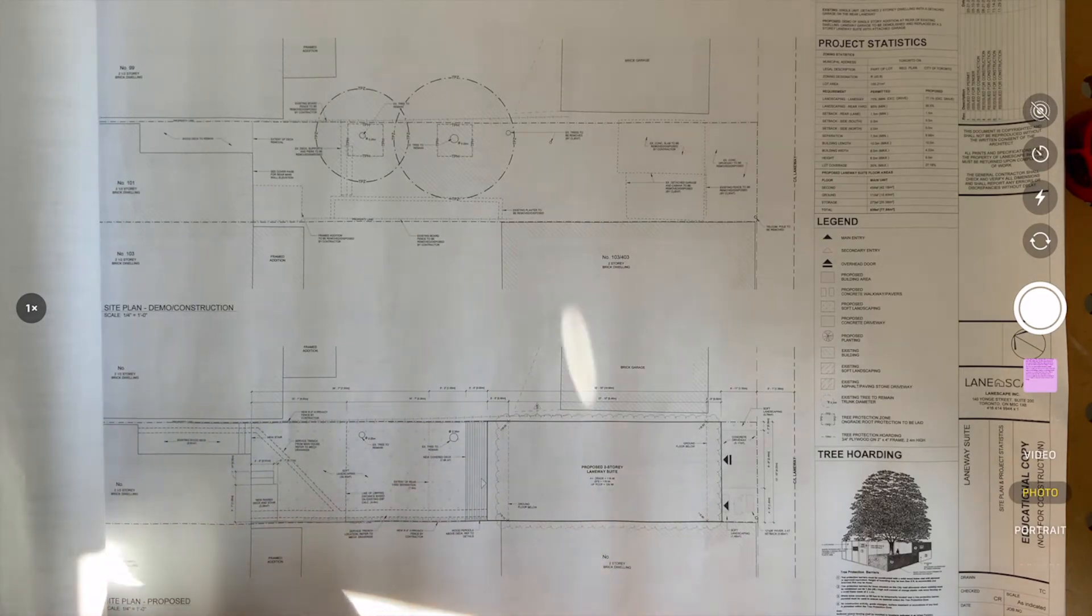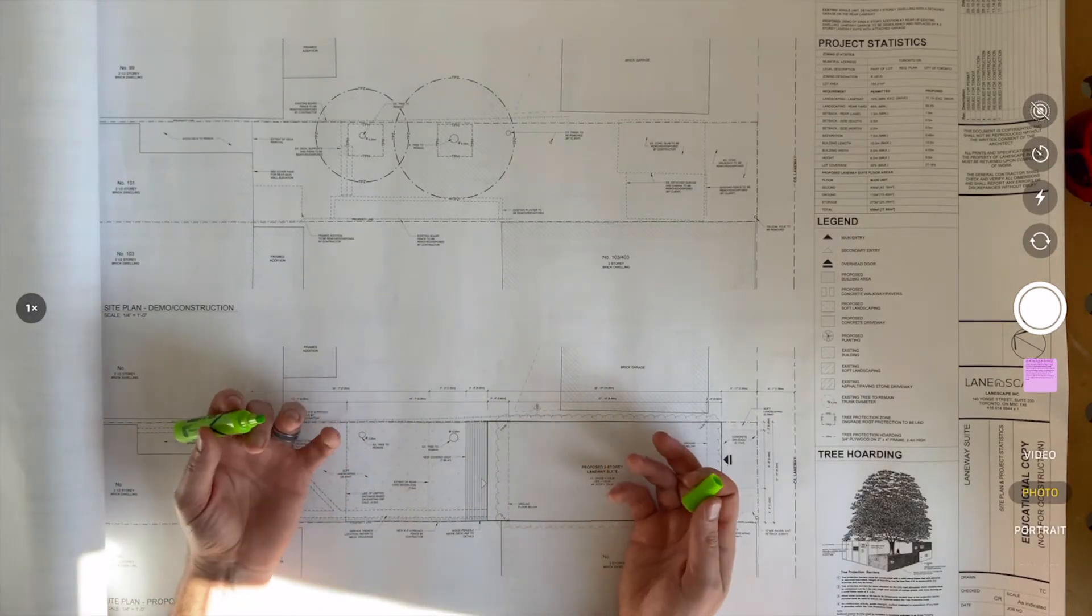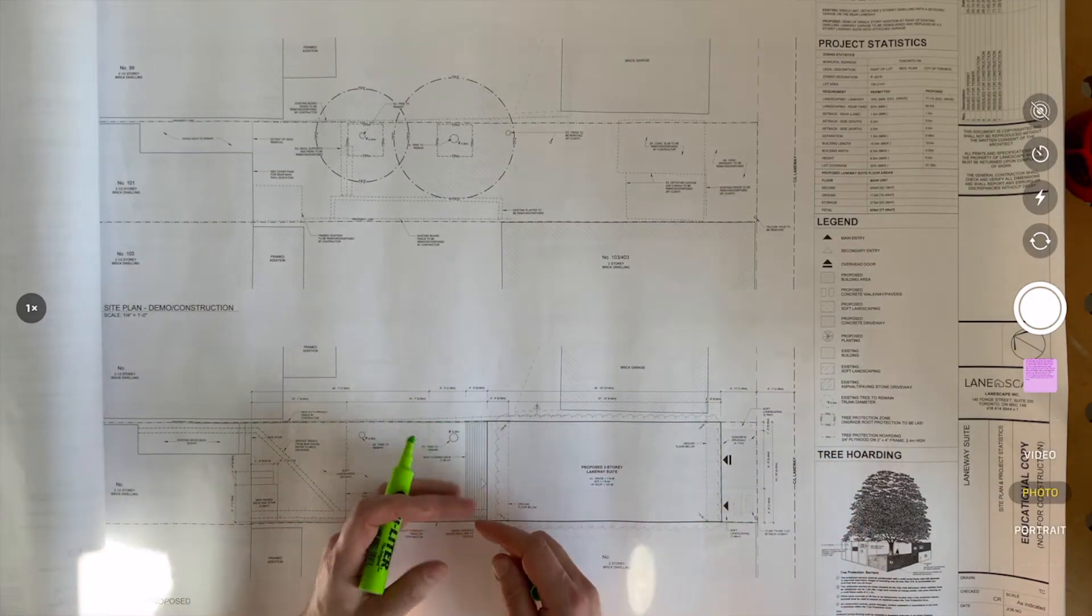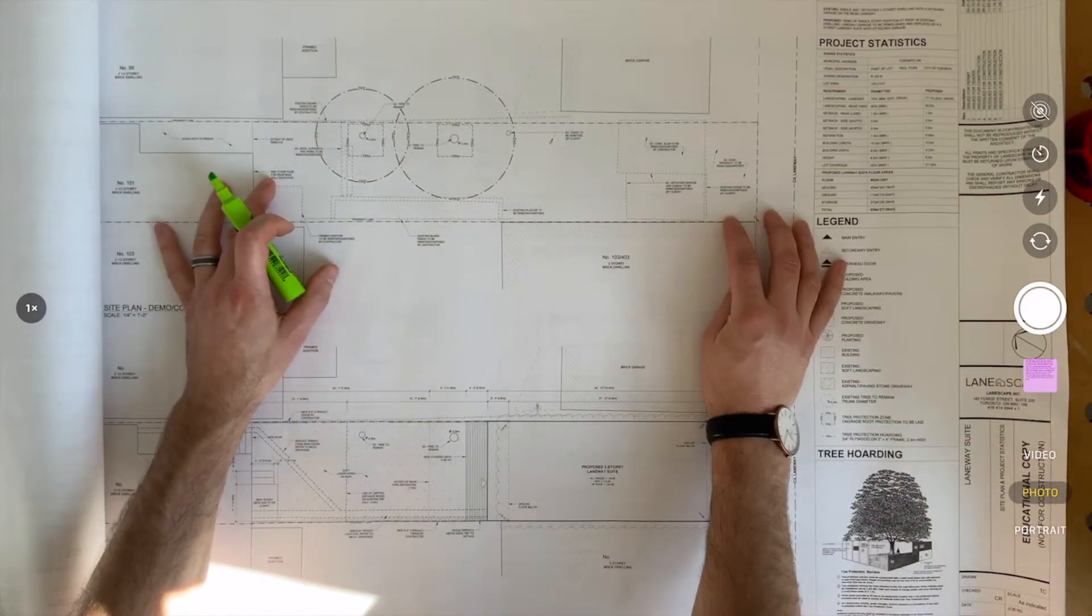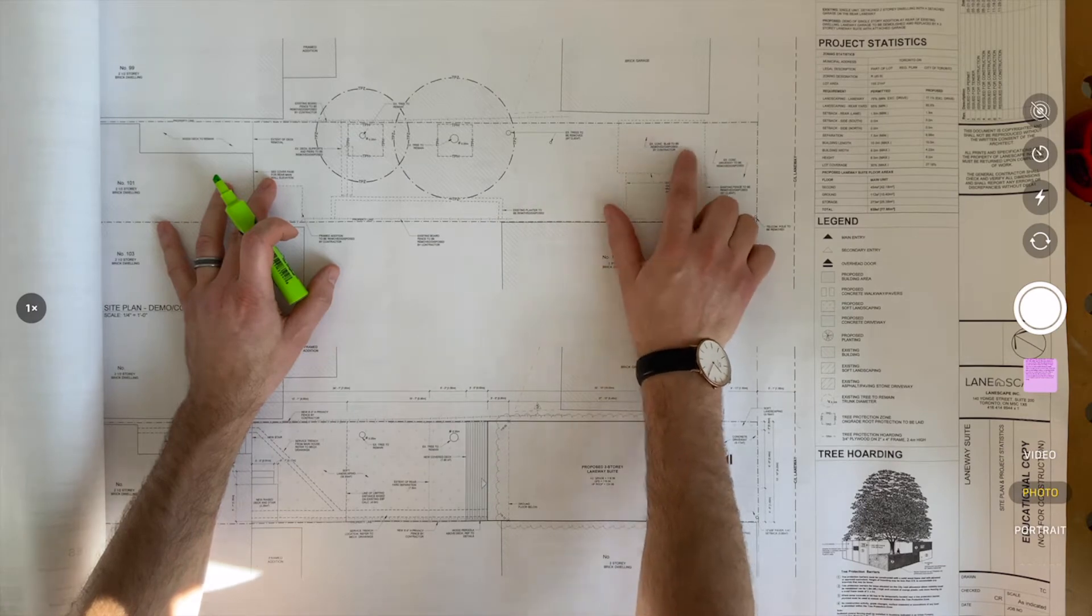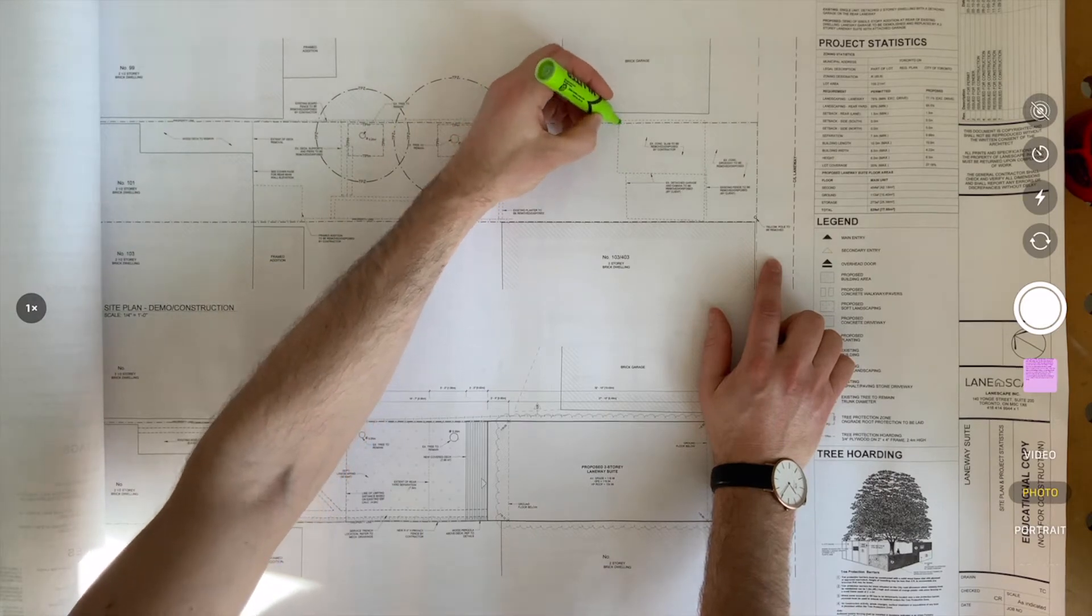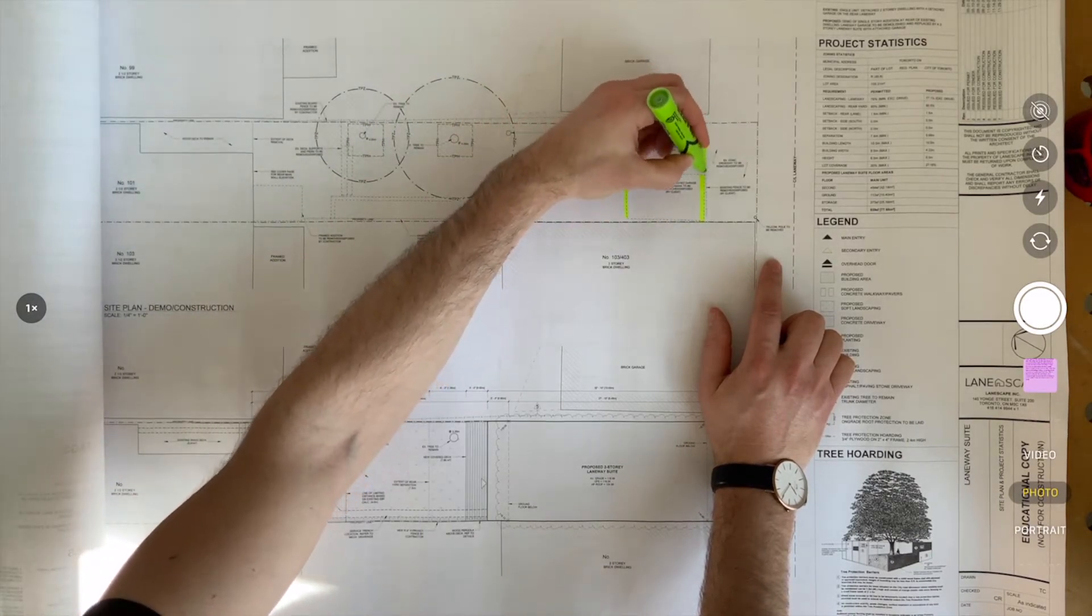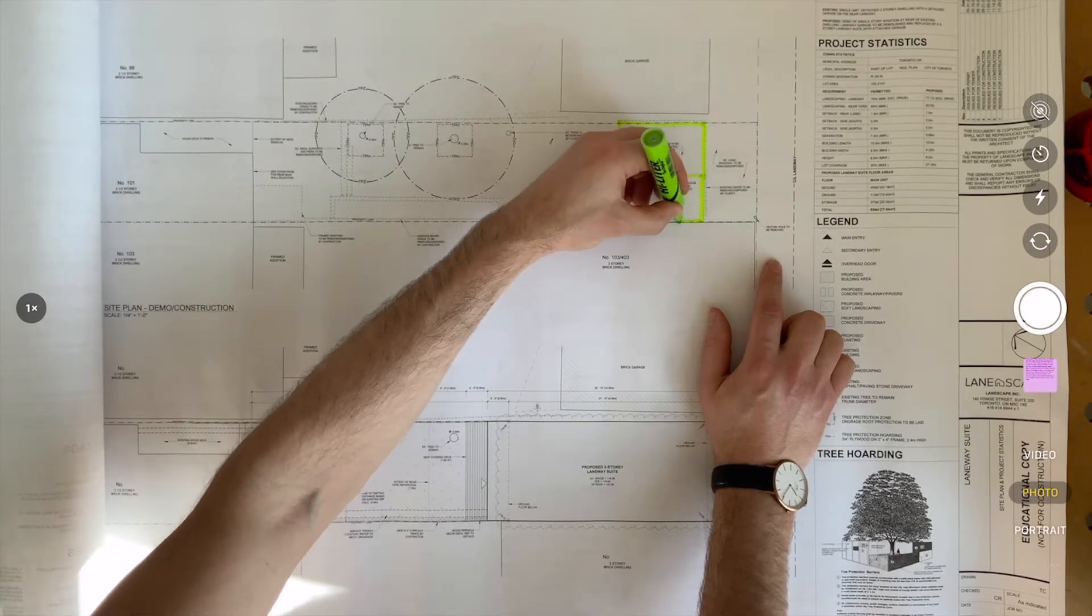So what I would start to do is get some pens out. I like to use green for scope inclusion that isn't referred to in the final structure. What do you have to do to make that drawing come to life? In this case, let's look at the existing plan. For us to be able to build a structure, it means that we have an existing garage and slab to remove. So I can simply take that area and highlight it to say that these two areas on my plan have to be removed by me. So I'm going to highlight those.